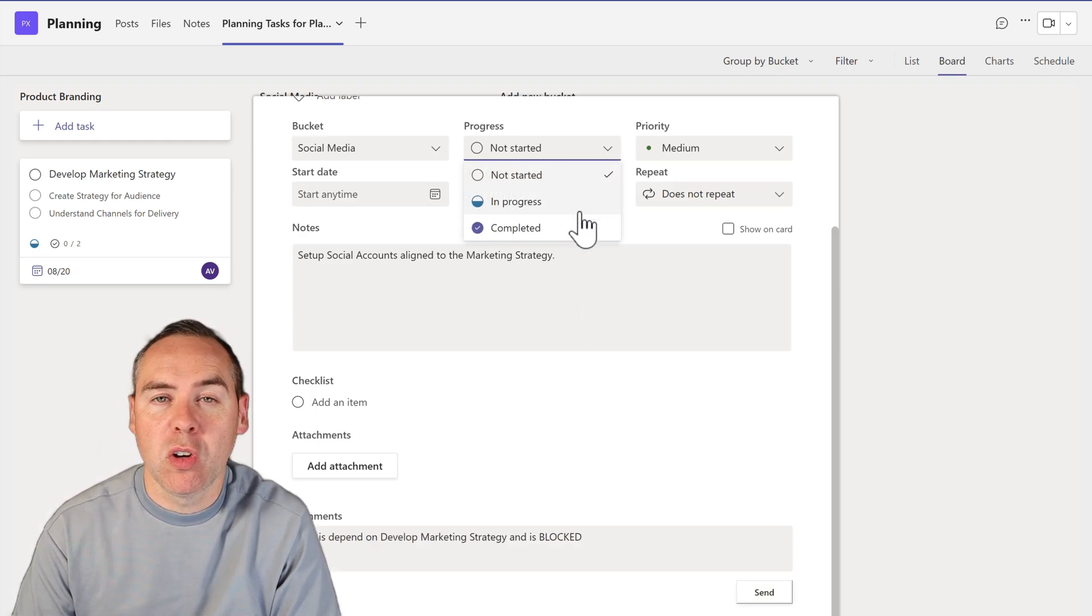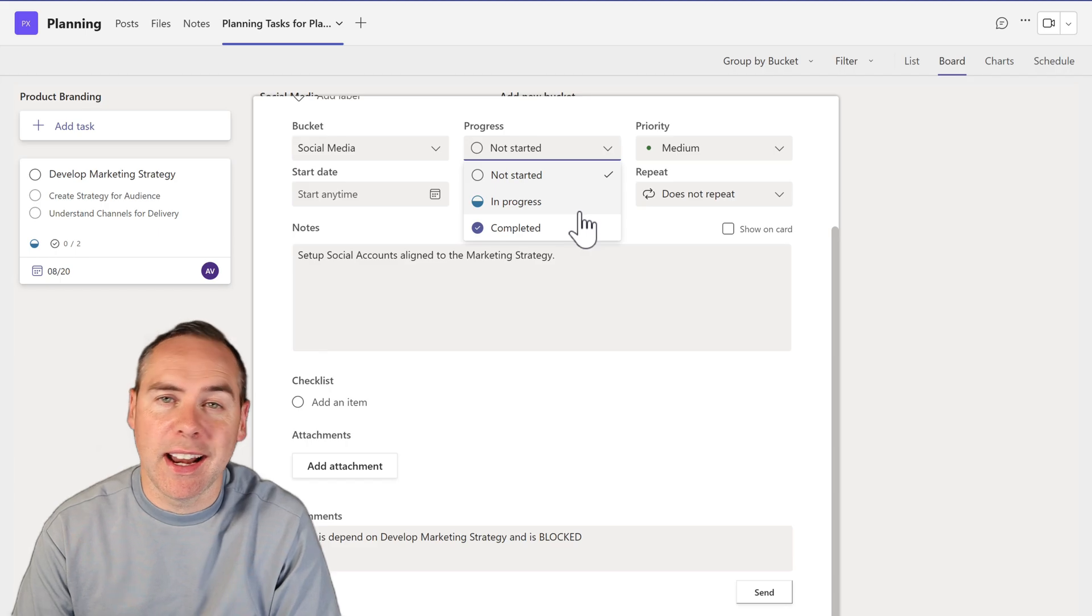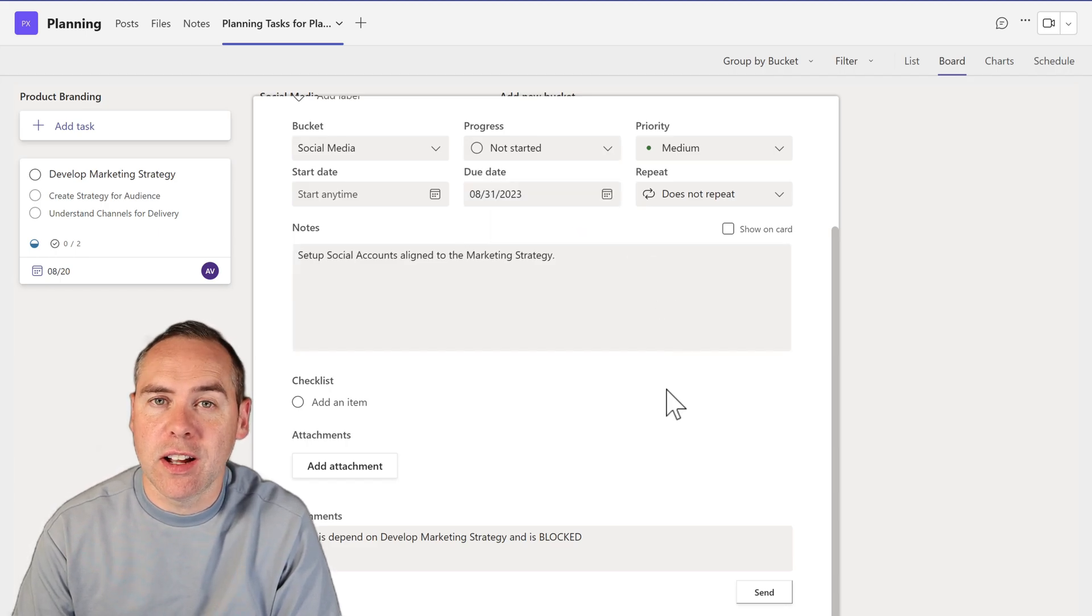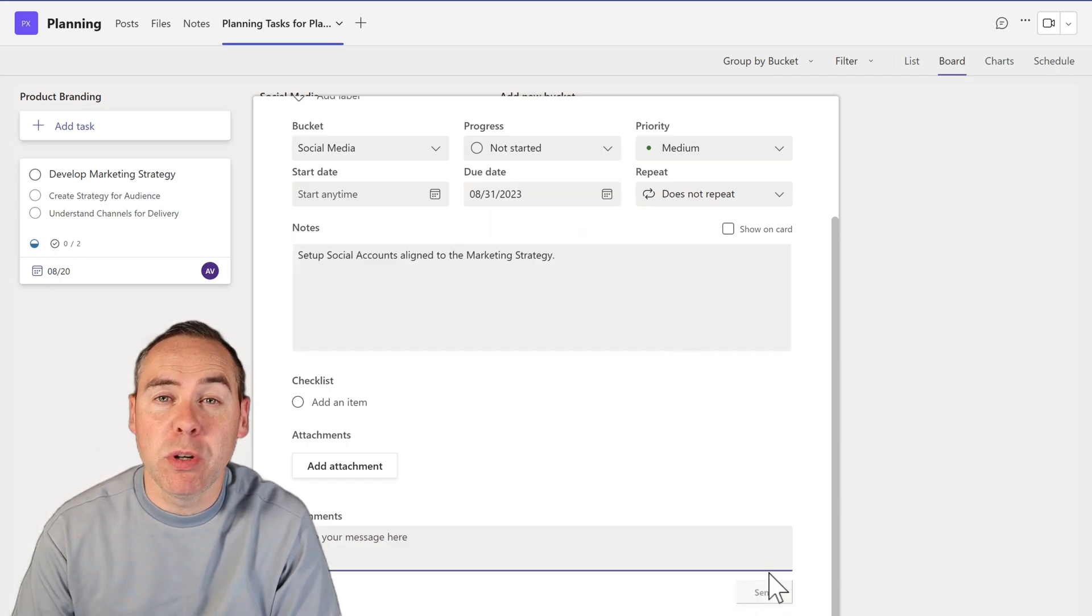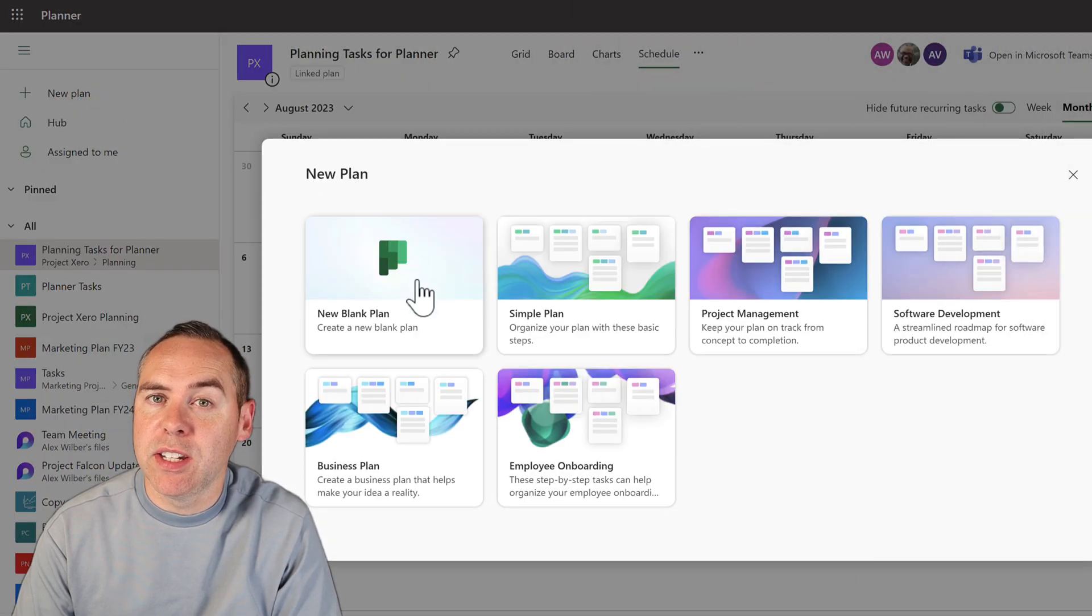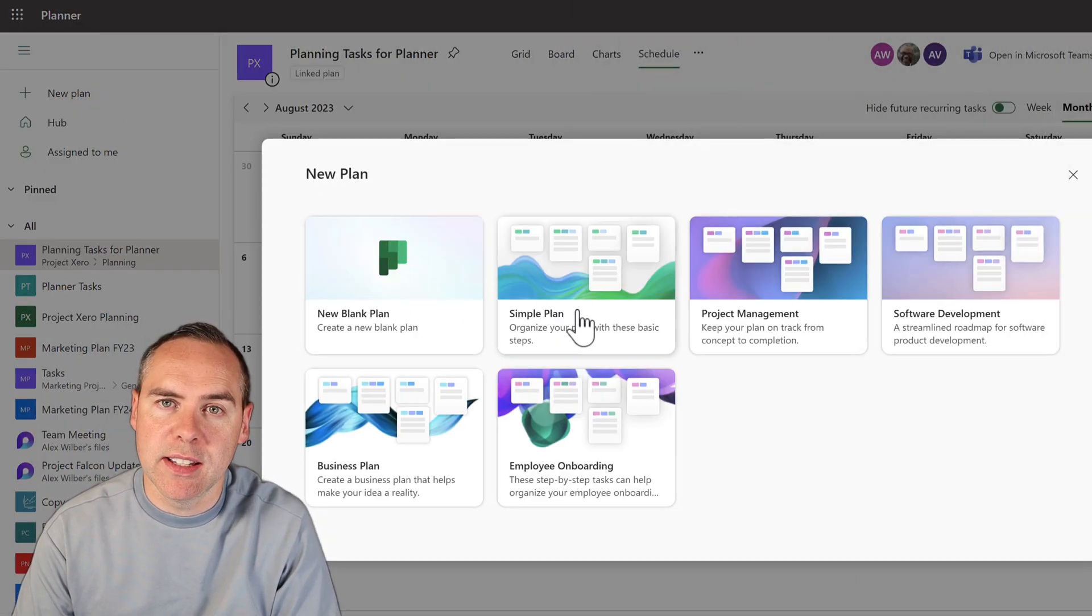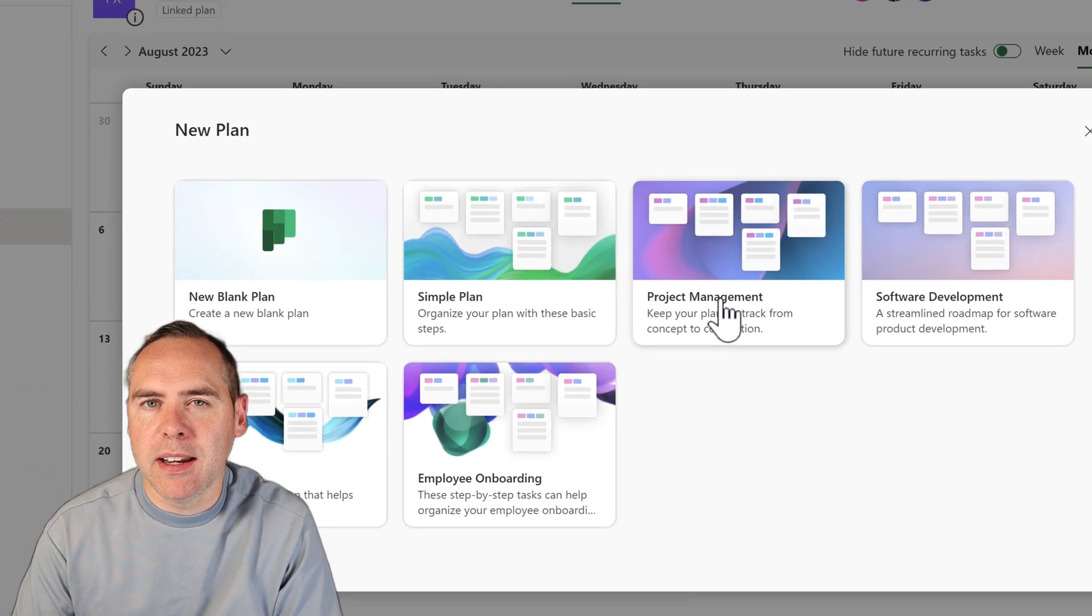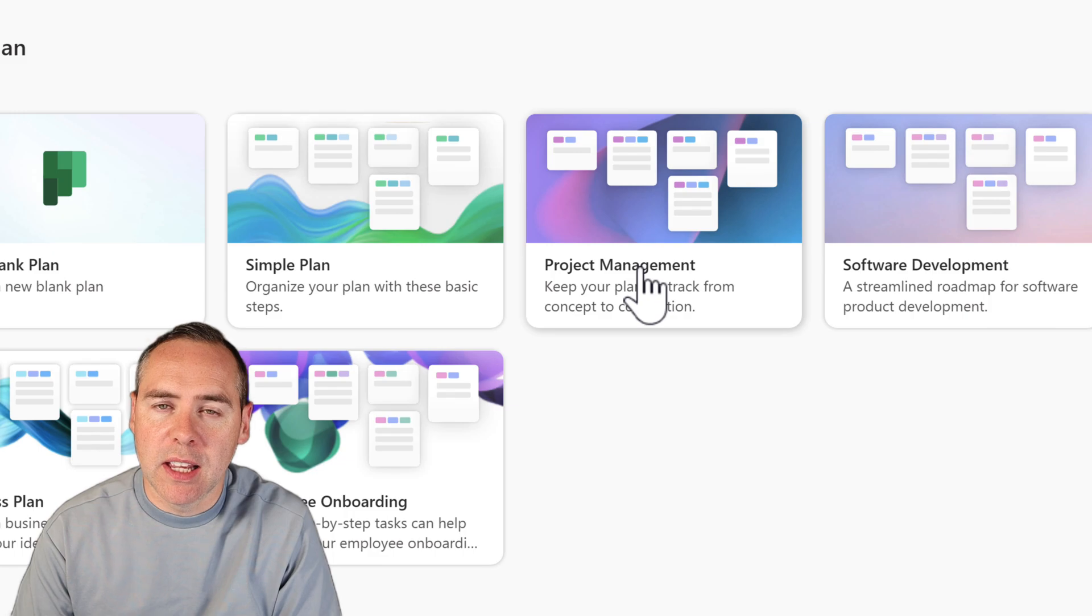In addition, it becomes blocked and our statuses are not started, in progress, and completed. There is no ability in Planner to have a different set of statuses. That problem then gets bigger.